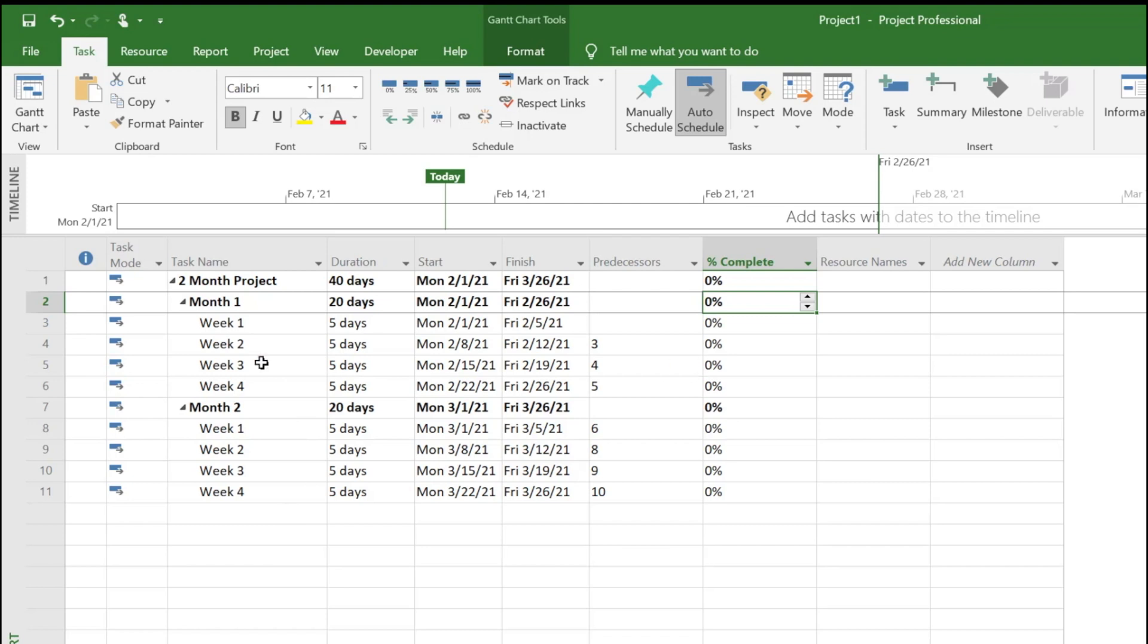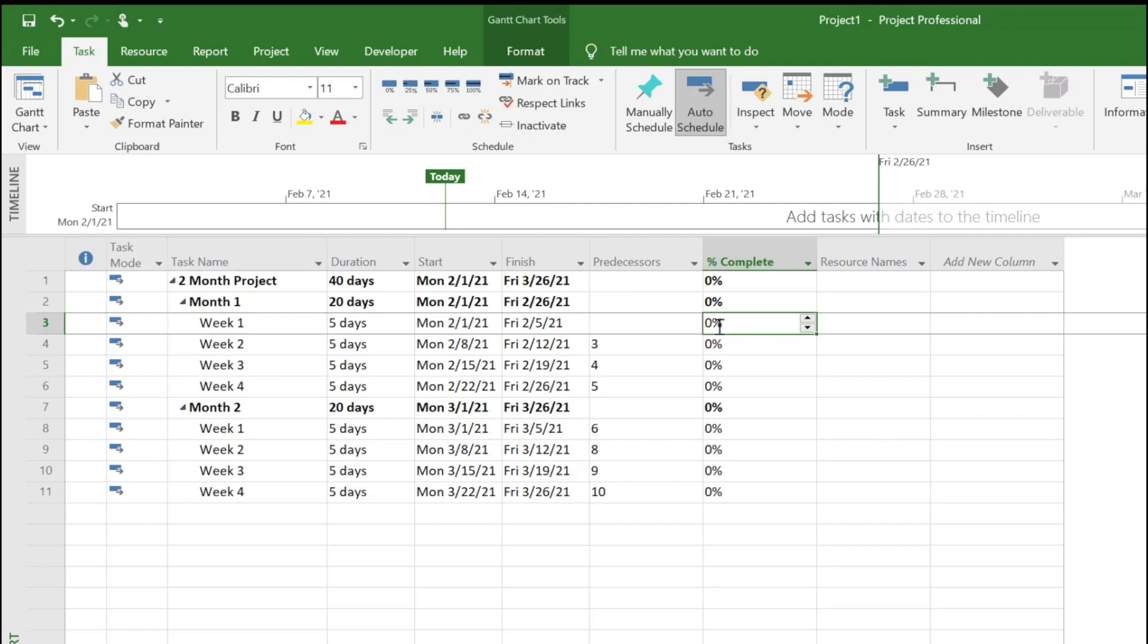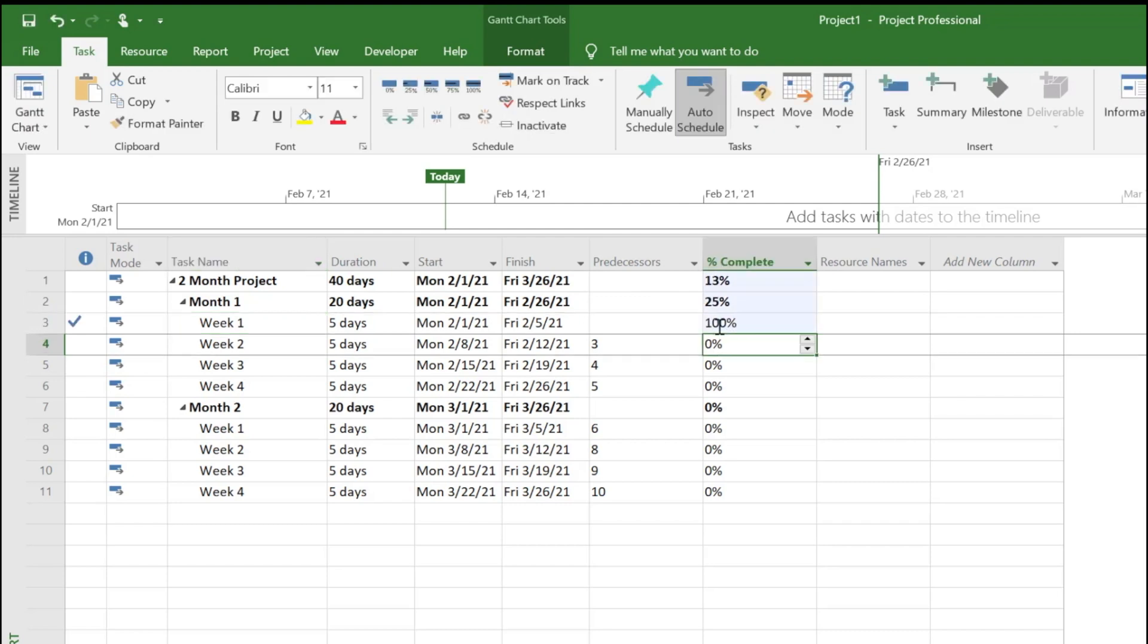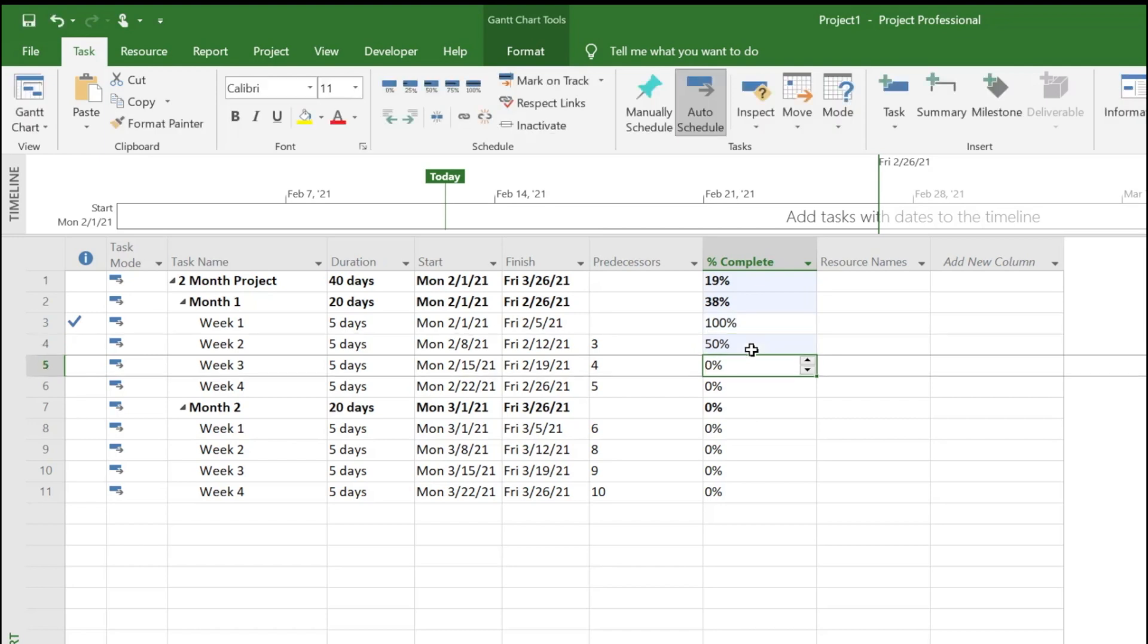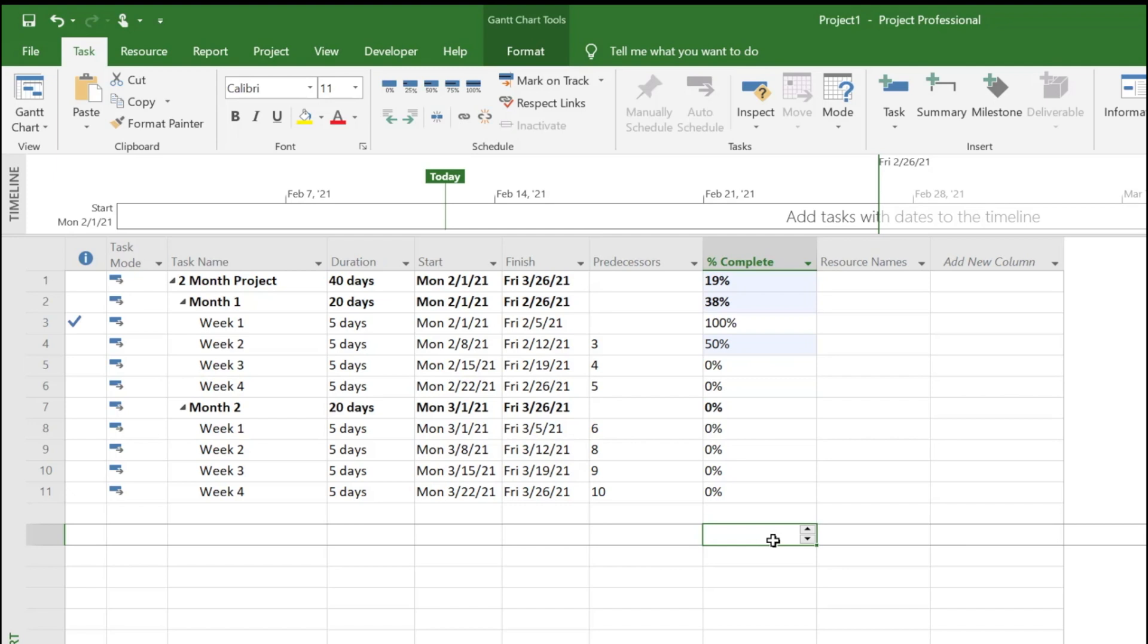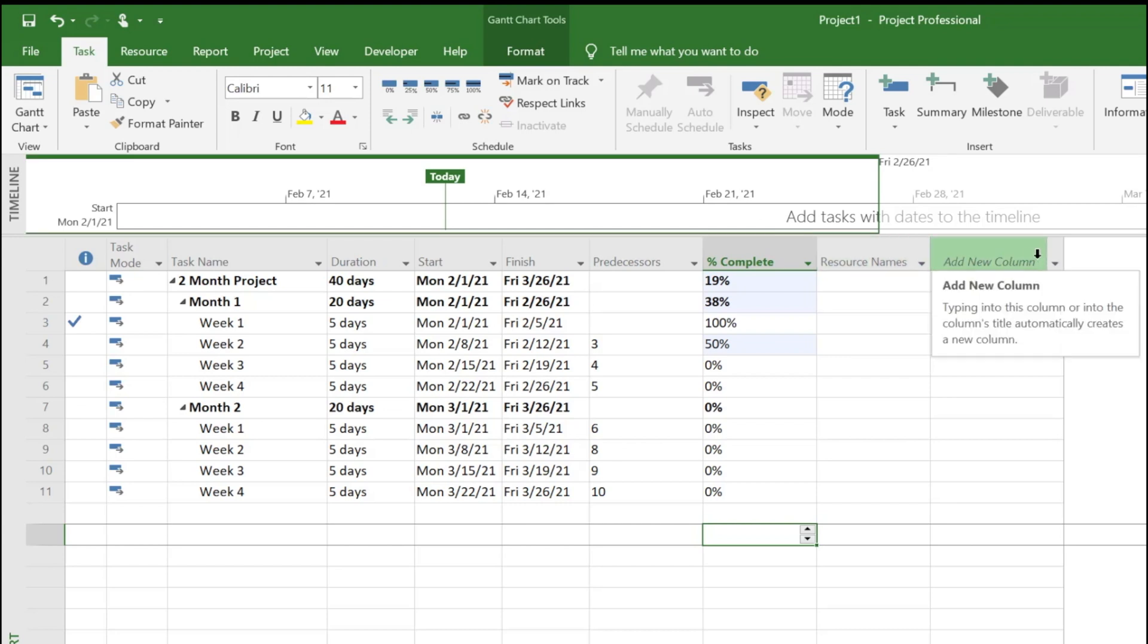Let's say this is our project and we want to know as of today what tasks are late. Obviously here none of them have started. Let's say week one activities was completed at 100 percent, and week two should be completed 100 percent as of today because it's Friday the 12th, but let's say if it's only 50 percent complete.